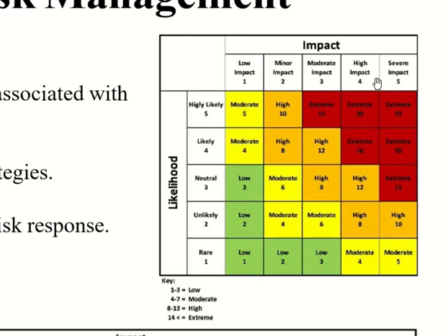For example, an earthquake in Bahrain is a very, very rare event. It may not have happened for many, many years, so you can ignore it. In most building design, we don't consider earthquakes, or in construction activities. Or there could be events which are very likely, but the impact is very low.